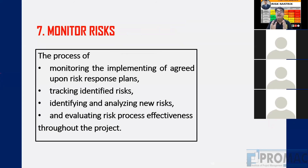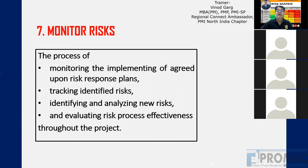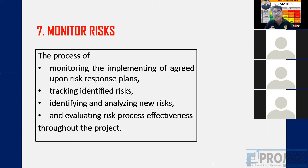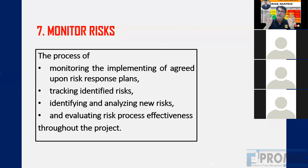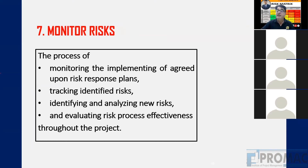Monitor Risk is the seventh process — planned versus actual. Did the risks we planned for actually occur? Was the cost reserve we set aside sufficient? Was the schedule margin we kept adequate? Risk management is an iterative, continuous process done throughout the project — every month or every 15 days we must do a reassessment of our risk plan to check whether risks are happening and what impact they are bringing.